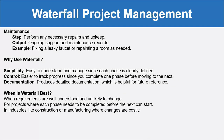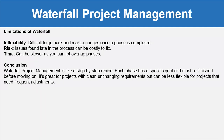Why do we use waterfall? Waterfall is very easy to understand and manage since each phase is clearly defined. It is easy to track progress since you complete one phase before moving to the next, and it produces detailed documentation which is helpful for future reference. Waterfall is best used when requirements are well understood and unlikely to change, and for projects where each phase must be completed before the next can start — for example in industries like construction, manufacturing, and software development where changes are costly.